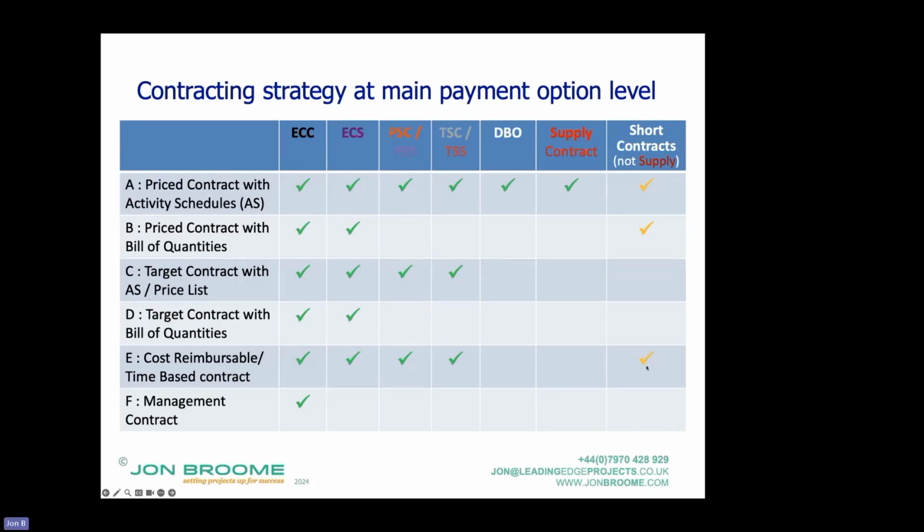Or you could say, give me in the price list rates for the people and the construction equipment that you will use, and effectively it becomes an input-based contract, not a pure cost reimbursable, because it's not at cost, it's the price that you've given me for the inputs. Okay, so bear that in mind when we're going through them and what they are.